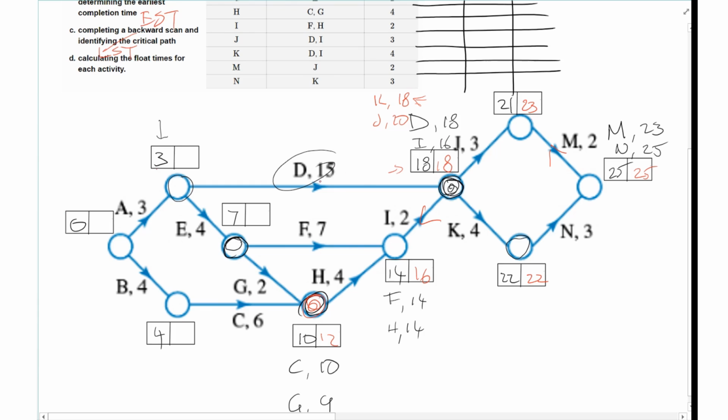So coming from the opposite direction for D, I'm going to have 18 minus 15, which will give me 3. But remember, what that means is I've got D and E coming in. I'm going to have D coming in here. I'm going to have E coming in there. So I'm going to have D and E. So D is going to give me 3. We'll come back to E when we get to it.